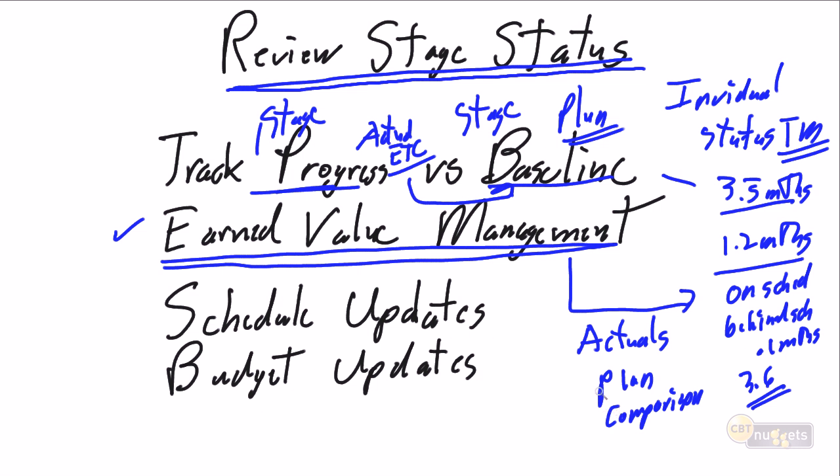And simply put, at 1.2 months into the project, based on the progress we've gotten from our team, knowing that we are now at 0.1 month behind, the simplistic answer from our project manager says the project is going to be delivered in 3.6 months, which is that 0.1 month behind schedule.